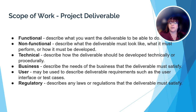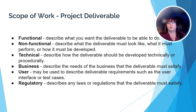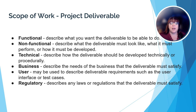The first thing to understand when planning a project is exactly what the deliverables need to be, and the more detailed, the better. If we have a detailed understanding of the scope of the project, we are less likely to experience scope creep, meaning other things that are added to the project deliverables as the project is implemented. Project deliverables are what the project team will deliver when the project has concluded. The Work Breakdown Structure will identify anything about the project that is relevant: what the deliverables will do, what it will look like, how it should be developed, what need it will satisfy, how users will use it, and if there are any laws or regulations that must be considered and followed.